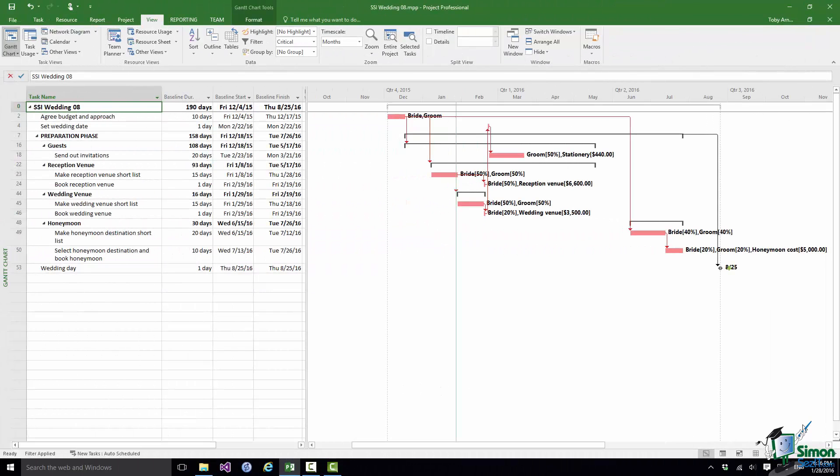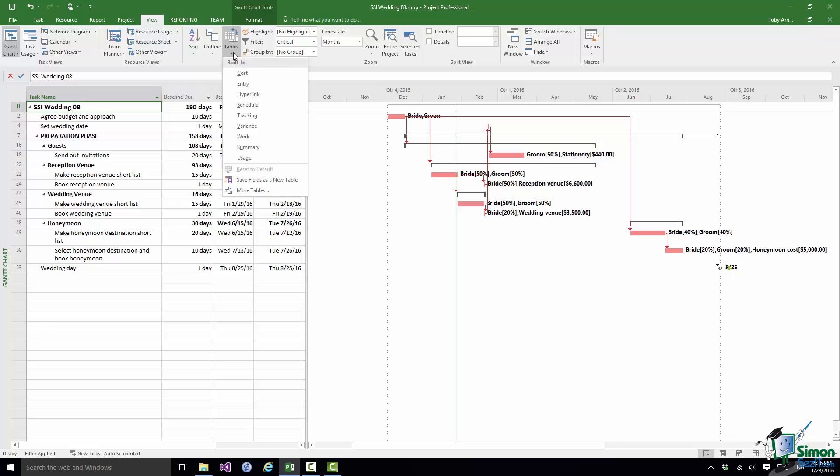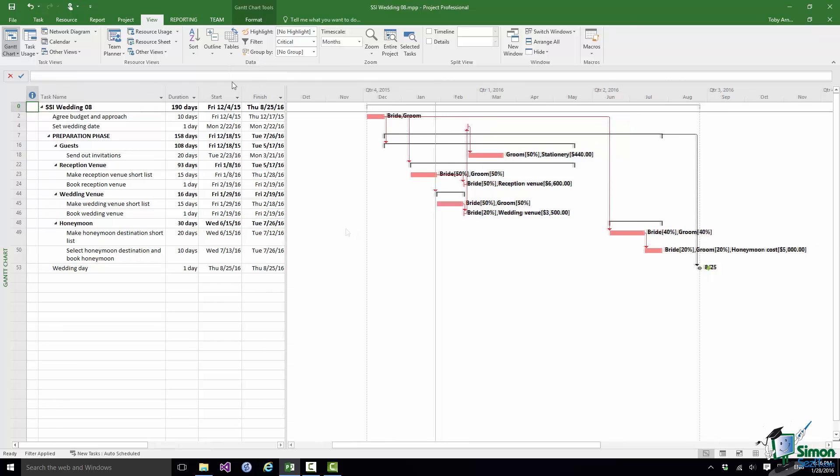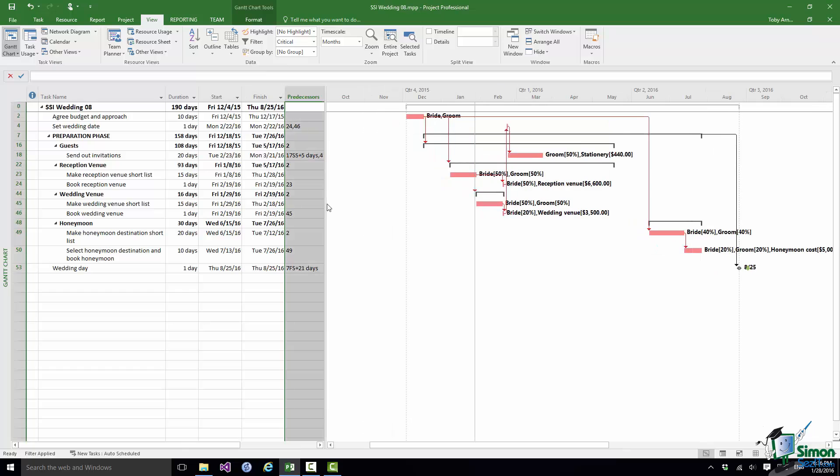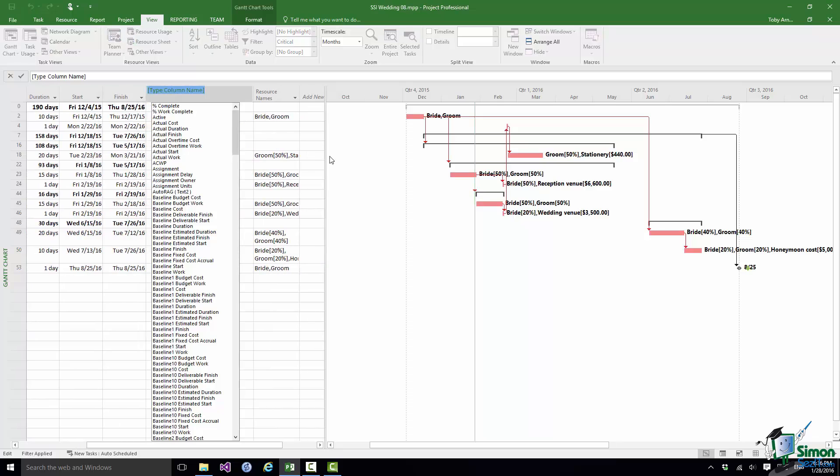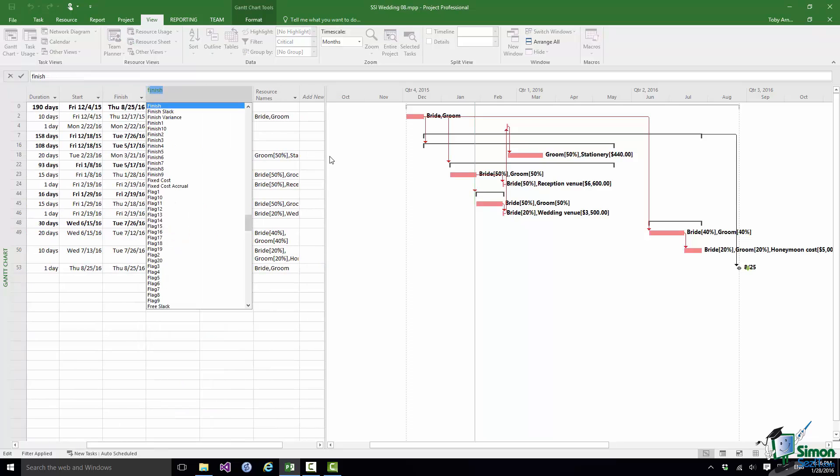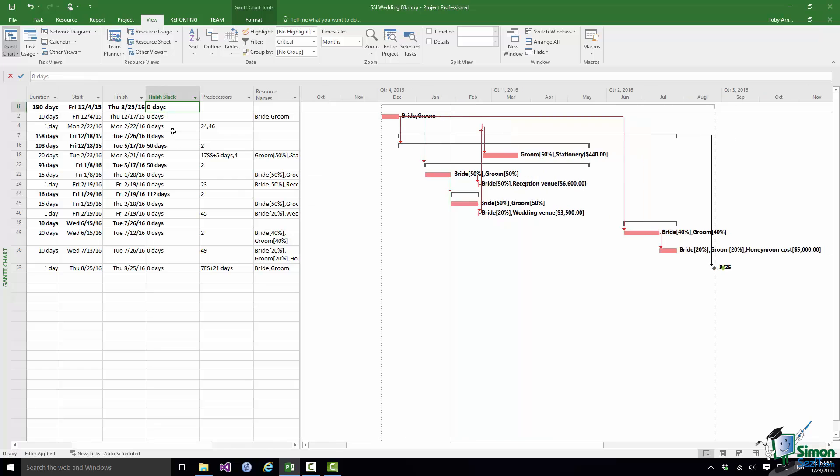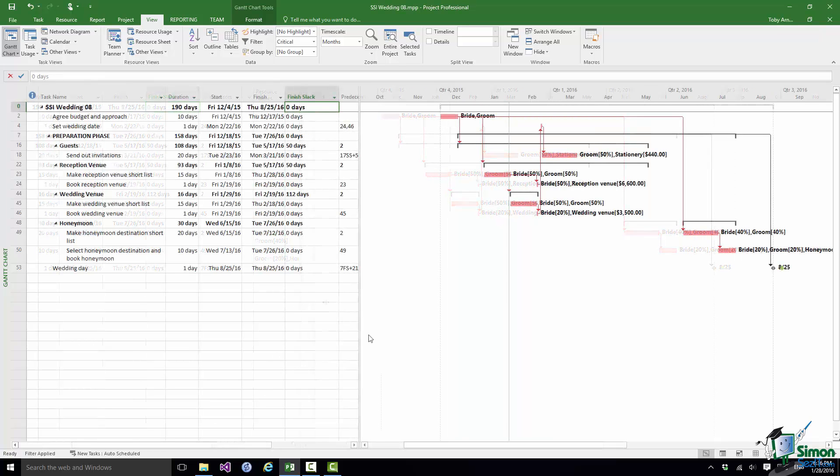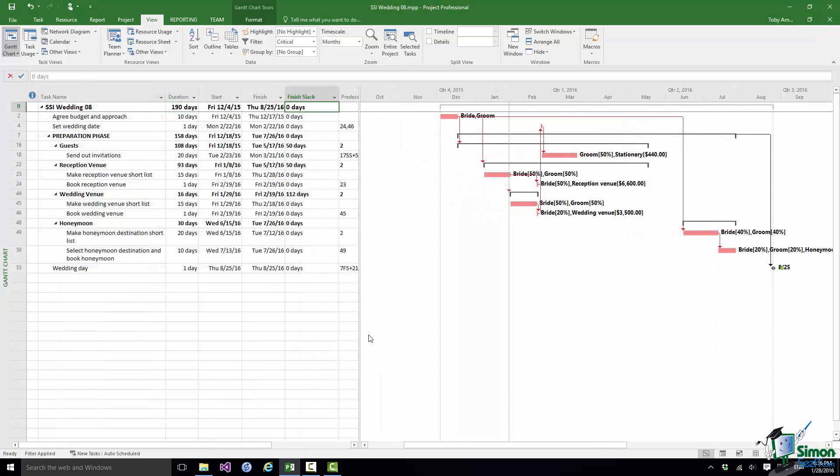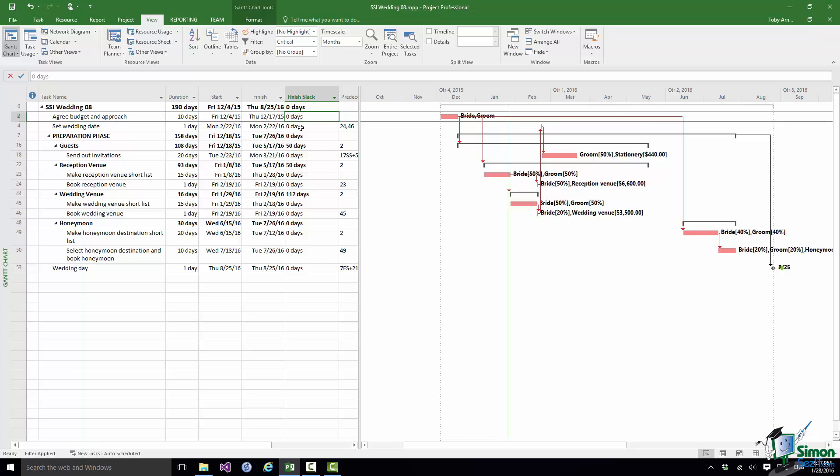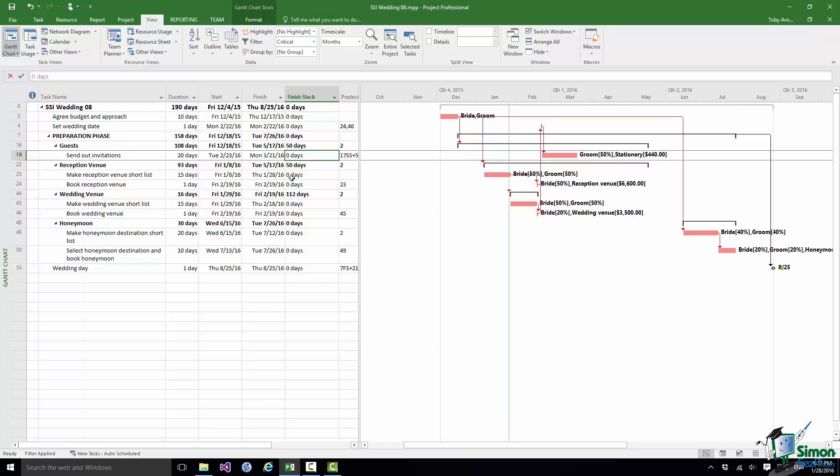So what I'd like to do now is show you another way of looking at criticality of tasks. First of all I'm going to change the table that's in use here. I'm going to go back to the Entry table and I'm going to insert an additional column. I'm going to insert column and what I'm going to insert is called Finish Slack. What Finish Slack shows me is the slack, the amount by which any task can be delayed, its finish can be delayed without affecting the end of a project. Now for critical tasks their Finish Slack is zero days. And as you can see all of these red tasks have a Finish Slack of zero days.